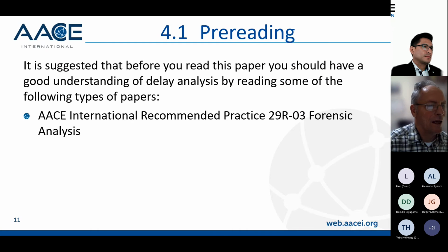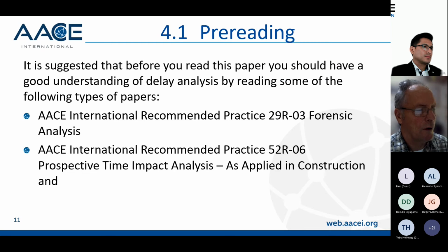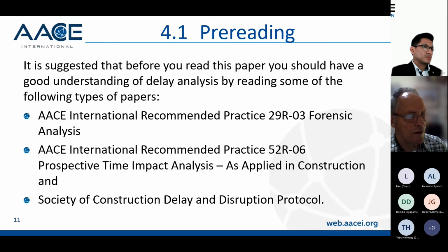But AACE International has a recommended practice 29R-03 forensic analysis. There's also the 52R-6, which is a prospective time impact analysis as applied to construction. And the Society of Construction Law also has a delay and disruption protocol. You might want to have a read through those to see what advice they have.